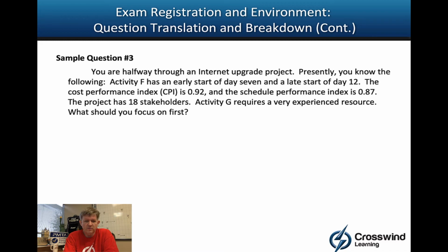Halfway through, so it appears I still have half the project to do, so I still have some breathing room to get things done, to make some adjustments. F I'm not going to worry about because it has 5 days of flexibility. If it slips 5 days, all of a sudden I'll worry about it, because then it would be on the critical path. Or if it starts to slip and gets near that, I might start paying attention to it.